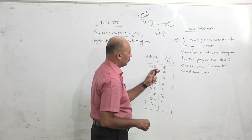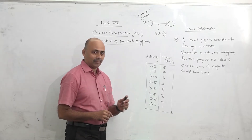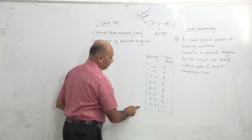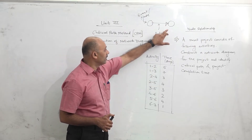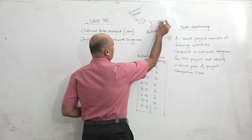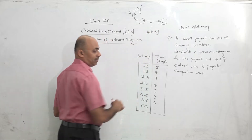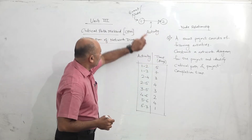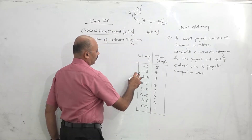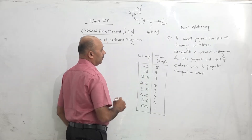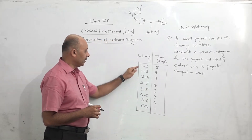Now if you see this question: a small project consists of following activities — construct a network diagram for the project and identify the critical path and project completion time. The activities are given in terms of numbers, and these numbers are the numbers of the respective events. For example, activity 1-2 is the activity which connects event number 1 and event number 2. Event number 1 is the start of the activity, and event number 2 is the end of the activity. This relationship is called node relationship — when the activity is expressed in terms of its events.